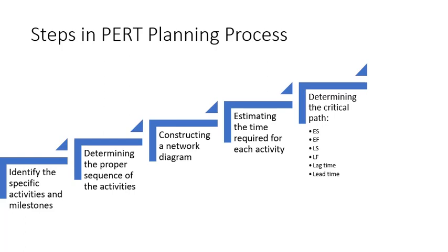If an activity is outside the critical path, whether it speeds up or slows down, the total project time does not alter. Therefore, the amount of time that a non-critical path activity can be postponed without delaying the project is referred to as slack time. Now, when we are actually constructing a network diagram, there may be a possibility that we are not able to determine the critical path very easily. If we are unable to determine it, there are certain quantities for each activity.